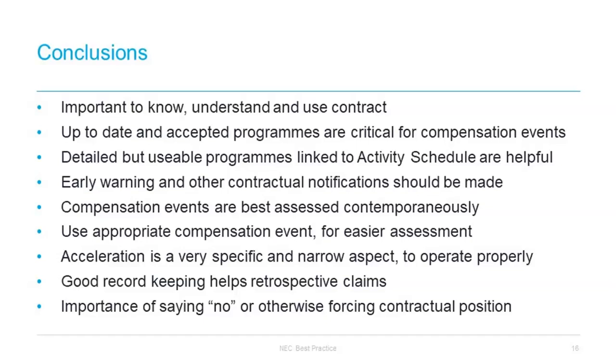We discussed programmes, and clearly the most important thing is to have one. Keep programmes up to date, notwithstanding any resourcing issues, and consider how to manage these issues if they do make this quite difficult. Operators should know what reasons are valid for rejecting a programme and what reasons are invalid. If the programme is being rejected for inappropriate reasons, tell the other side, put it in writing and keep it on record, but keep submitting your programmes as you go along.